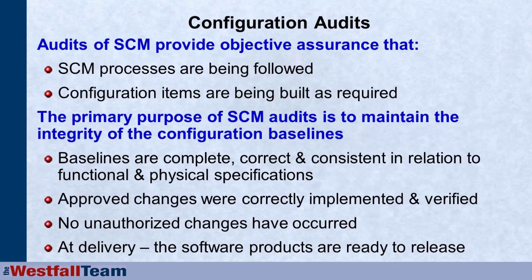So configuration management audits provide the objective assurance for in-process audits that our configuration management processes are being followed, and for the functional and physical configuration audits that the configuration items have been built as required, that they include all the functionality, all of the non-functional requirements, and they include the right versions and revisions of all the components.